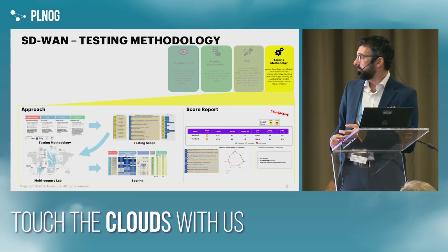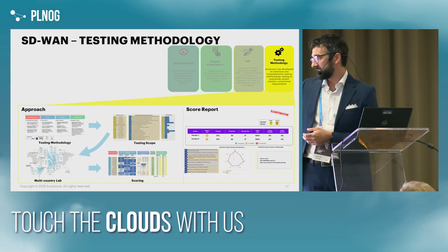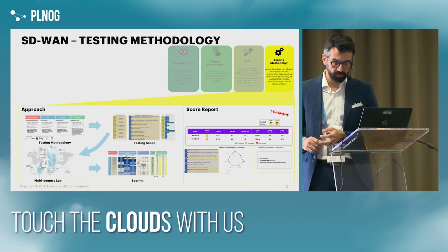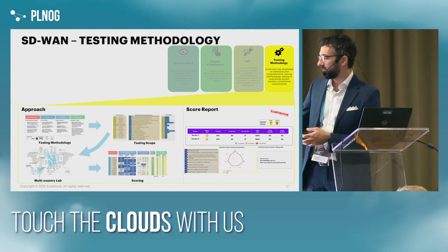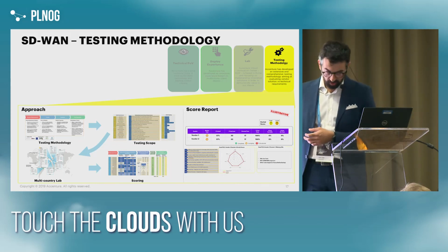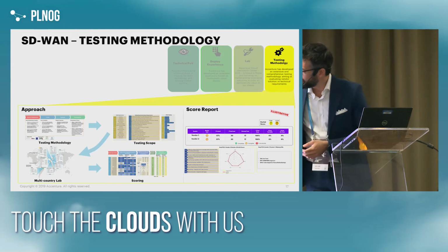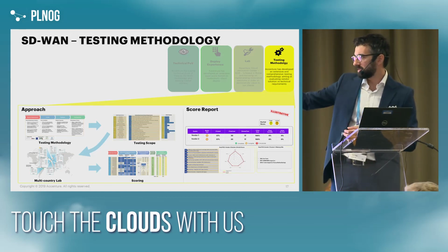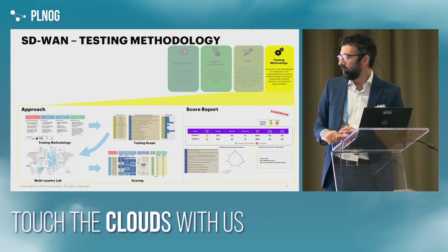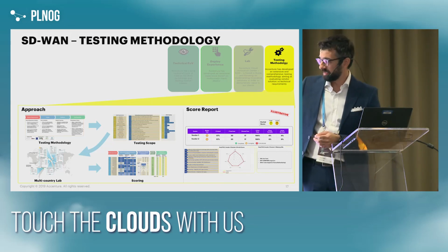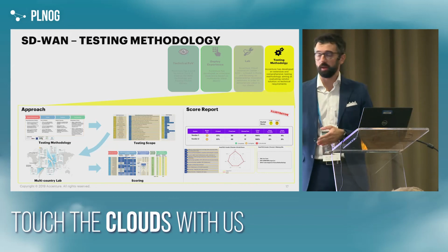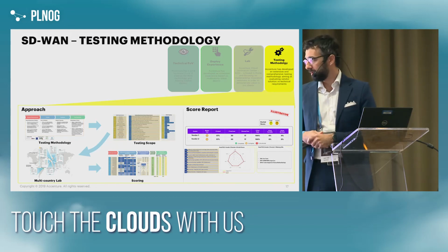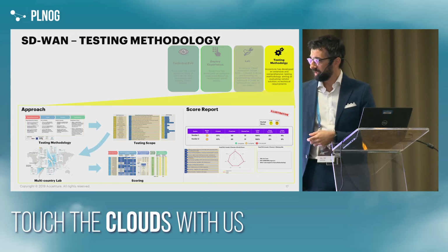The last thing is about our methodology. In several projects, we started with the client from selecting the right solution for them. We were scouting the market and defining which is the right solution. I know it's pretty small, but I tried to represent the whole methodology. So we had this approach: scouting the solution, defining a testing scope, which are the requirements of the client. Based on that, we defined a series of tests, and these gave a scoring.